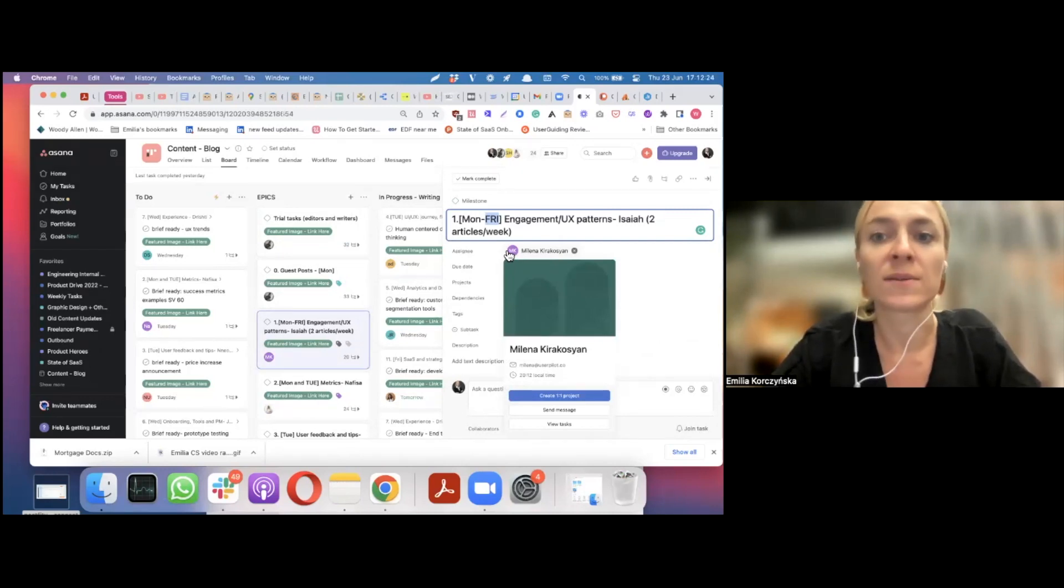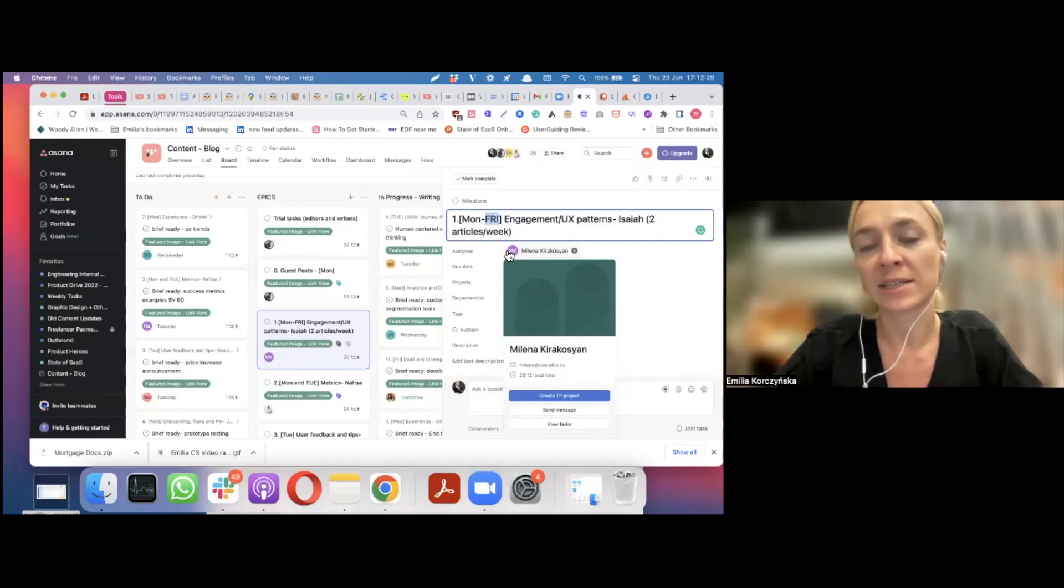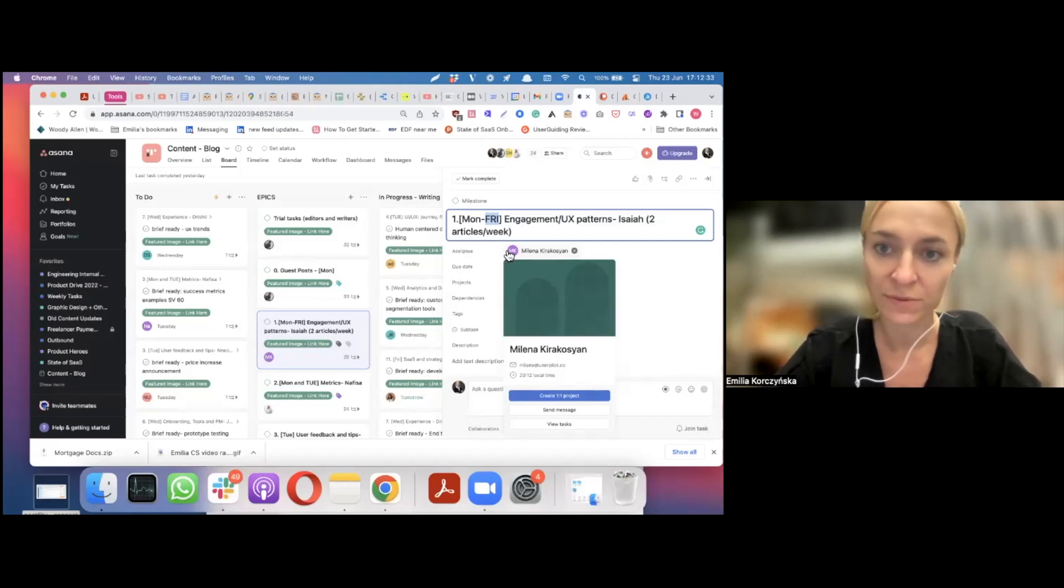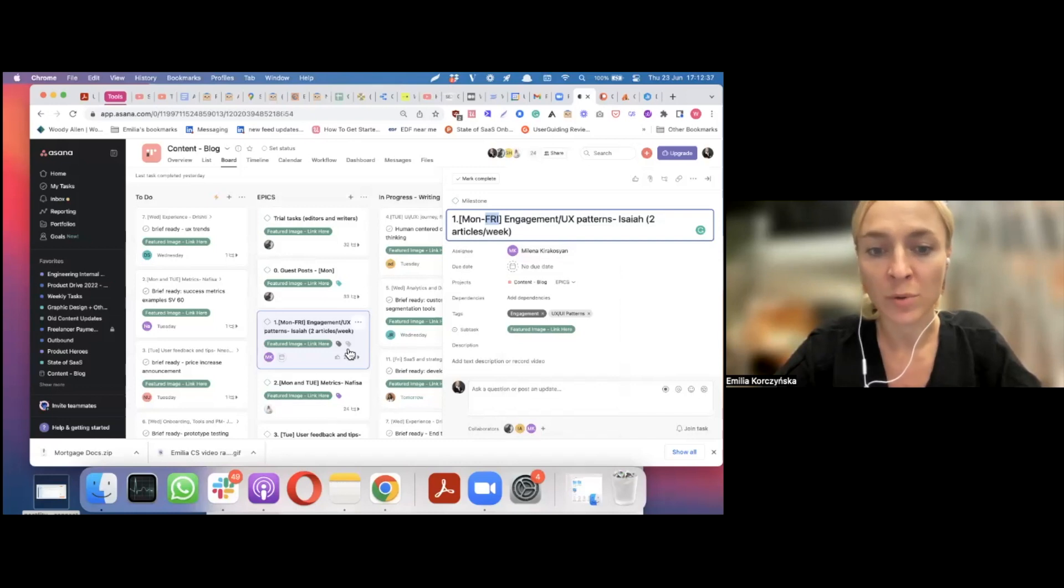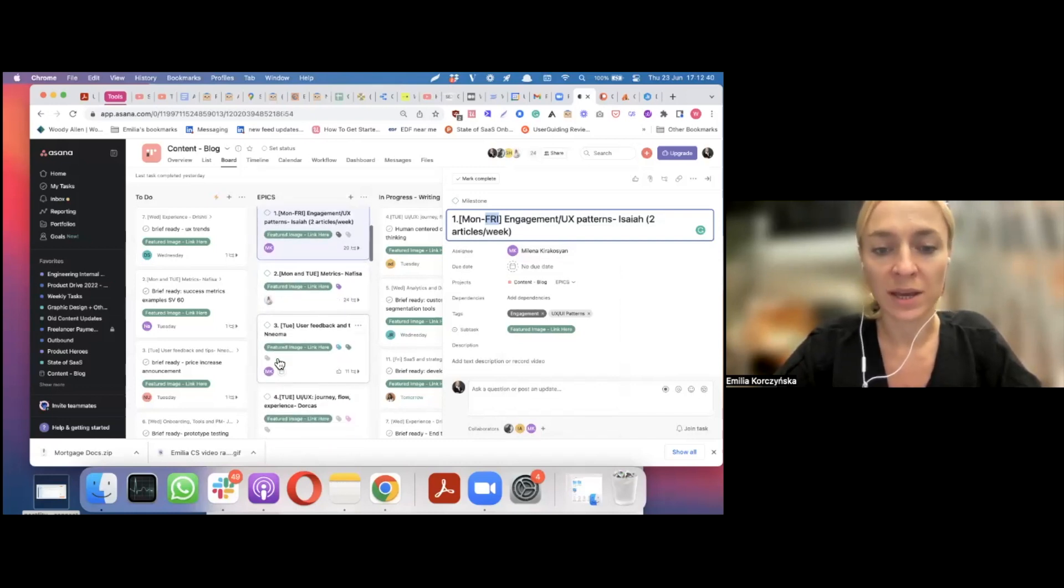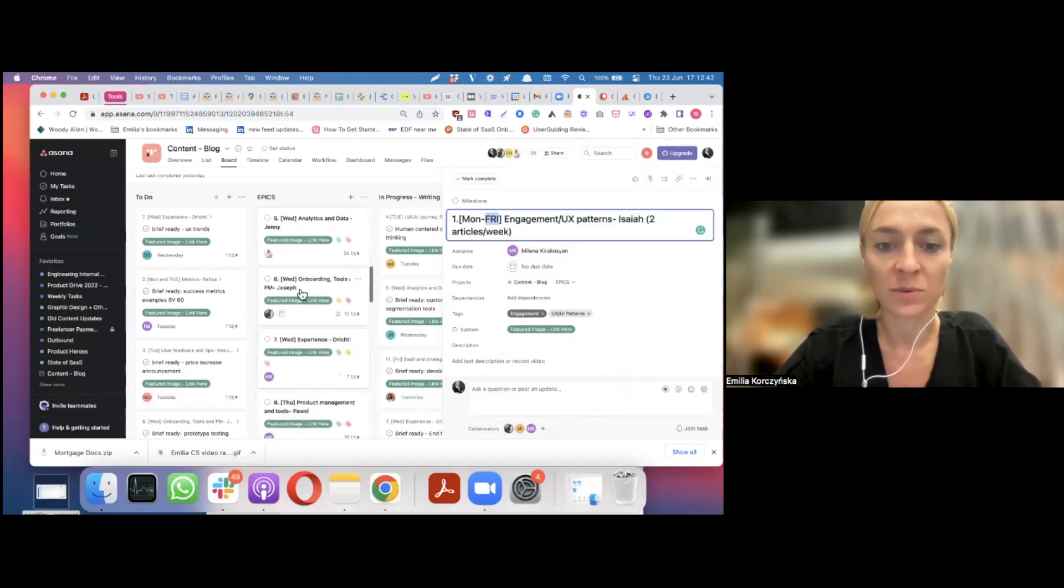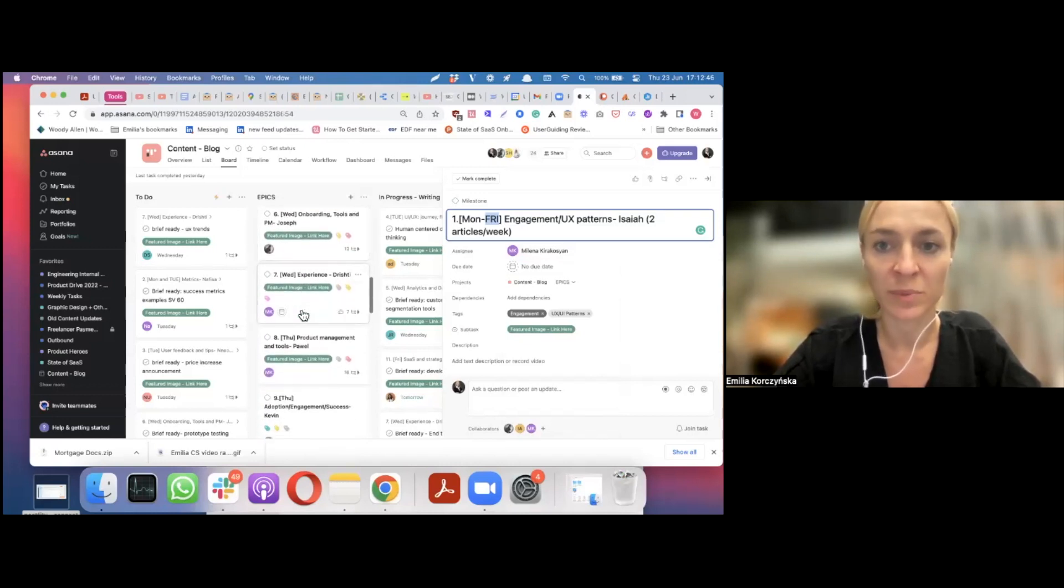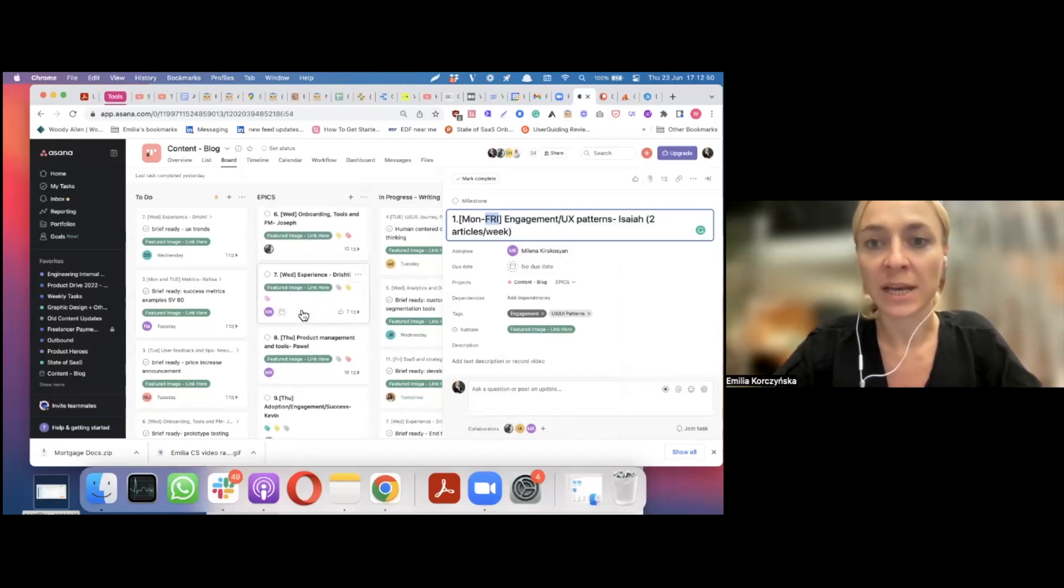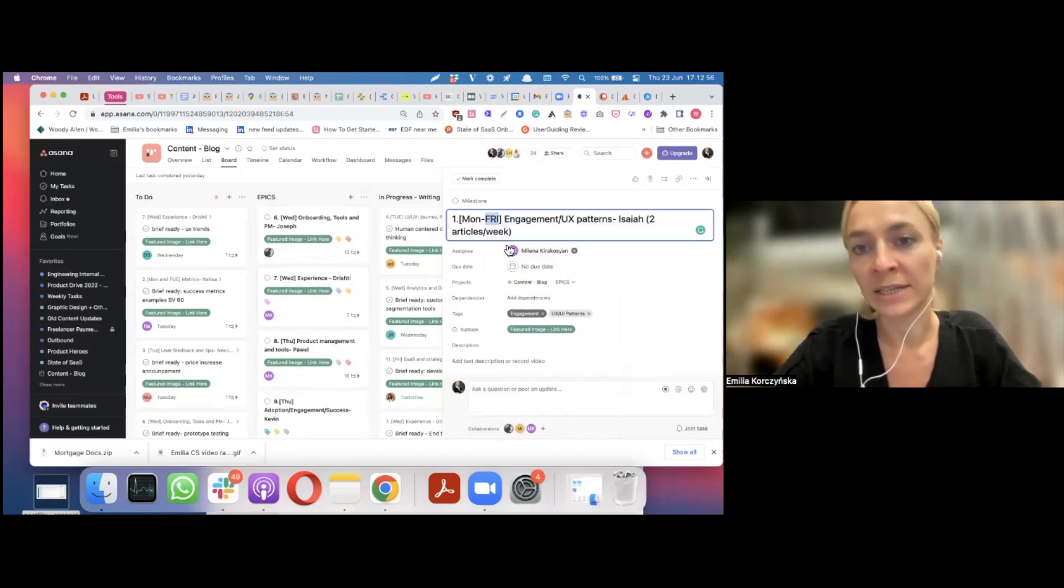This is the person that is responsible for quality of the blog posts. And, essentially, they're responsible for creating super, super detailed briefs for these posts. And I will show you in a moment. So, essentially, each epic has a delivery day on a specific day of the week. If we have 10, then it makes sense to obviously have two epics per day. And each epic is assigned to only one writer and to one editor.